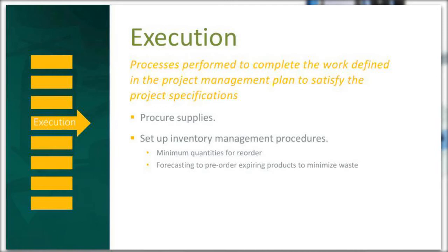Now, can you procure these items inside the U.S., or do you need to be able to procure outside of the U.S.? Remember, if the FDA has not cleared it, you're not going to get it into the country. Even if you promise that you're going to ship it outside of the country for use, it's not coming in.